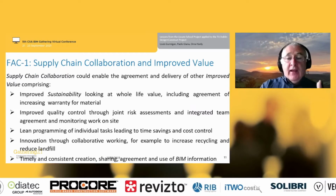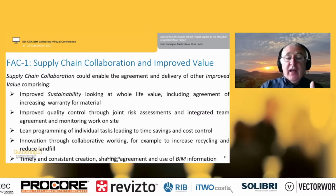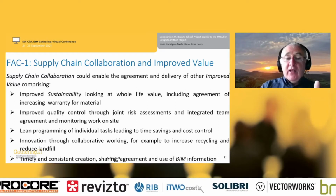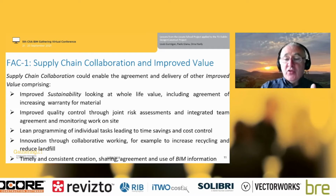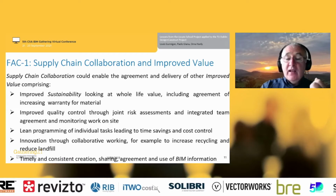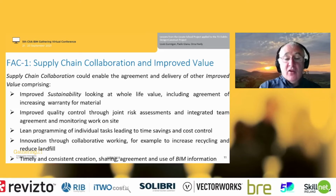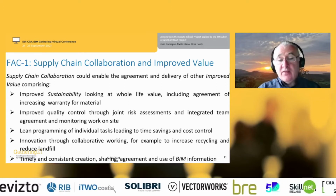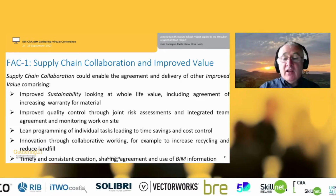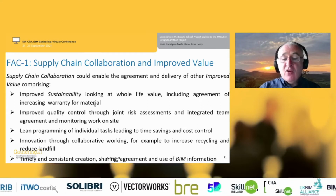The key thing that it looks at is the supply chain collaboration, and it looks at how you can sustain this right through the whole life of the project. It looks at improving quality control through the joint risk assessments, the integrated team agreements and monitoring of the work on site, lean programming. So in other words, everybody does all the programming together. So even the suppliers are involved in developing the program for the contract. It looks at innovation in relation to recycling and reduced landfill. And it also